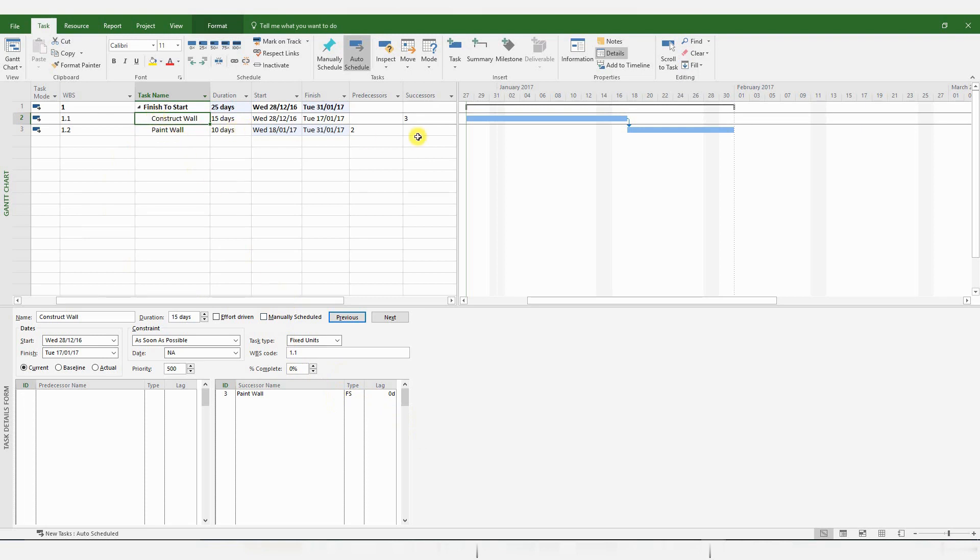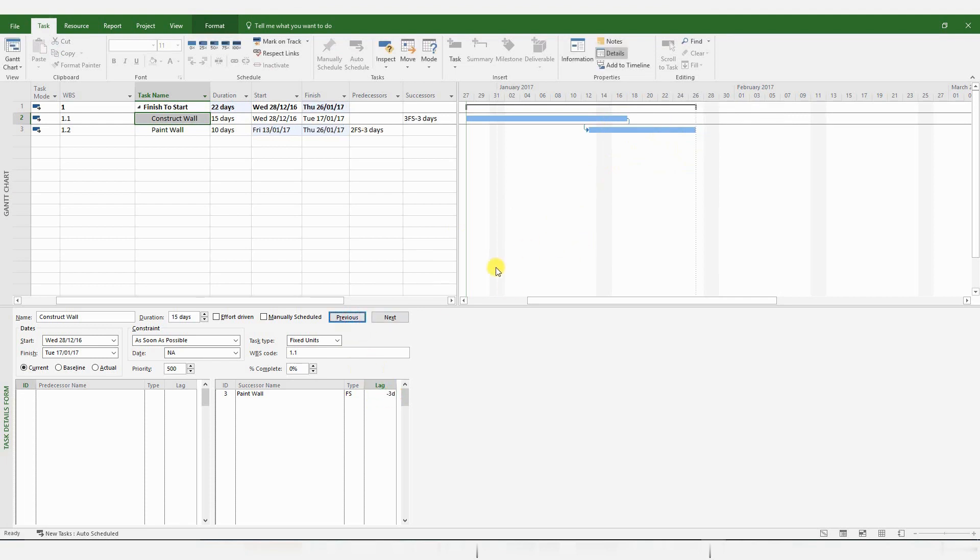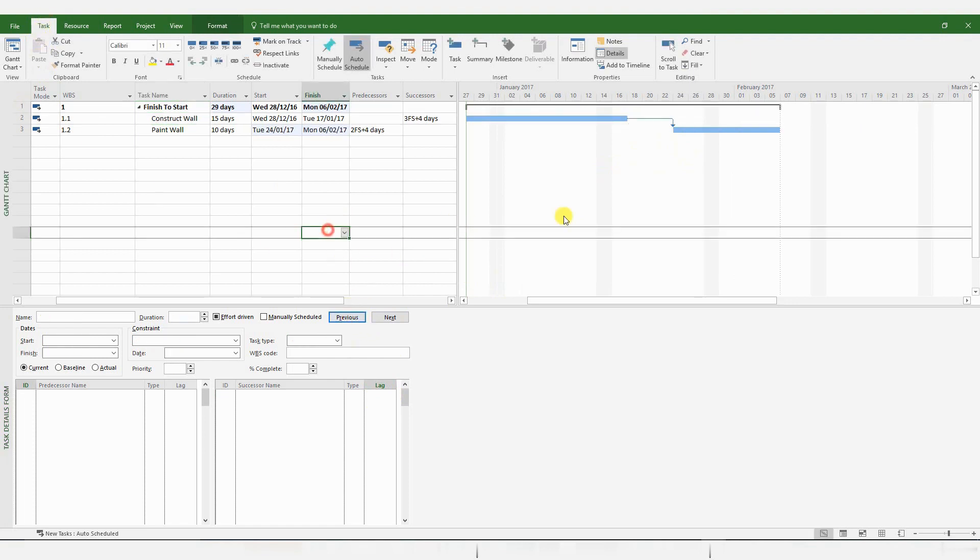And enter the days of lag you would like. And a lag is generated by MS Project. You could also have negative lag, but that is not generally recommended. So that's how you create a Finish to Start relationship and a Finish to Start relationship with lag.